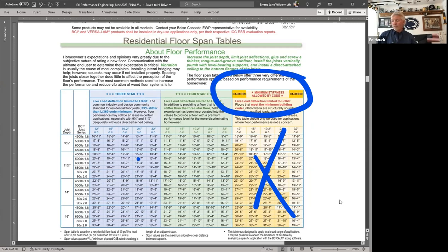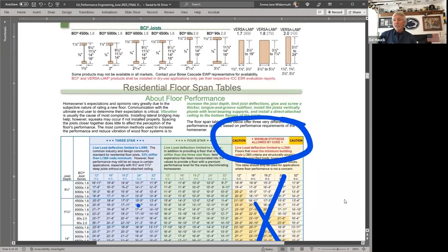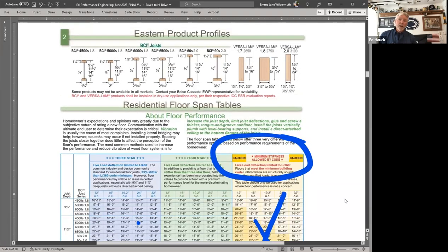When I first met Chuck, Chuck and Anna educated me on all the numbers they preach. So a lot of builders right now are 50, 55, 60% direct construction costs. When I first met Chuck and started working on mine, my numbers were about 35% on direct construction costs. To get those numbers down, you really have to understand everything we're showing you here. By the way, when you download this, there's a way that shows you how to assemble joist, how to assemble if you're using those rafters, how to size beams.